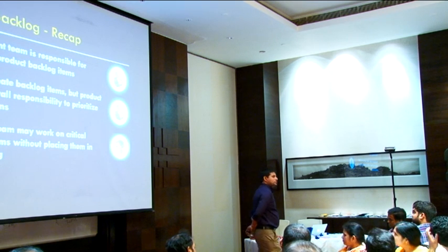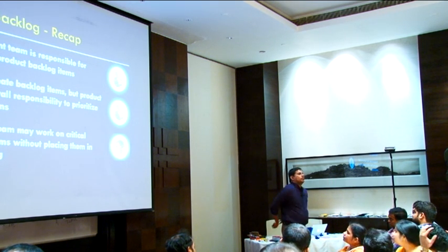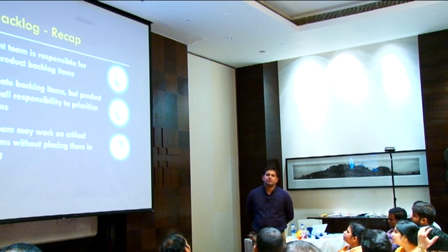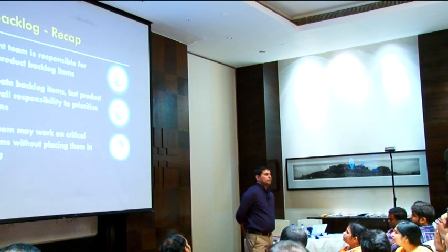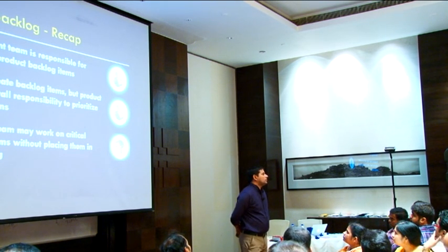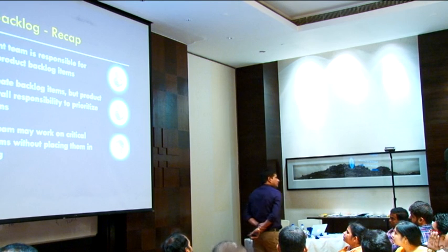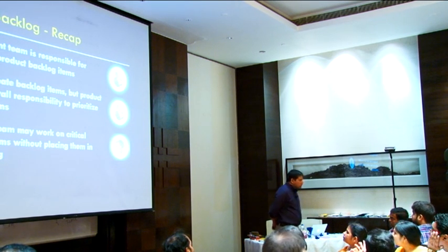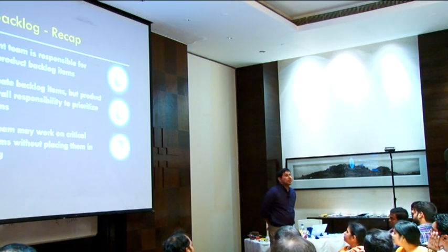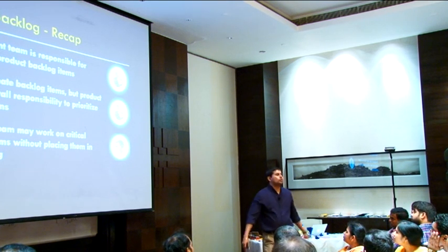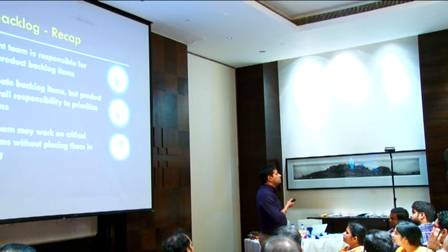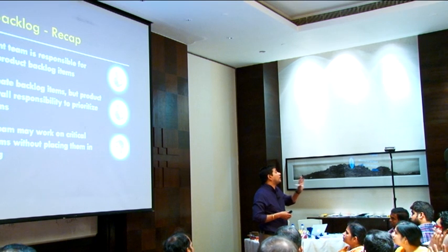Okay, let me ask you a question. You are working in a sprint and there is a very important item and the product owner wants to bring it into the current sprint, right? What is principle number 2? Welcome changing requirements. If that is really, really urgent, we may have to collaborate and maybe you need to remove something, but the sprint goal cannot be changed.